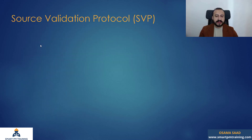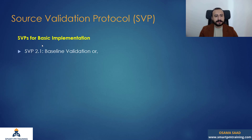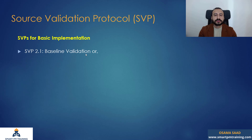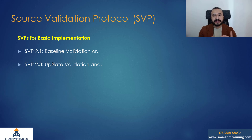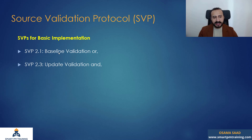What are the SVPs? For basic implementation we need baseline validation because we are modeling the impact against the baseline — we use the baseline as a reference and add new activities into it to evaluate the impact. Or update validation: according to the RP you can use the baseline or maybe an update of your choice to model the impact, but it is still a single base. We need only one schedule to evaluate the delays, and it's common to use the baseline for this delay analysis method.